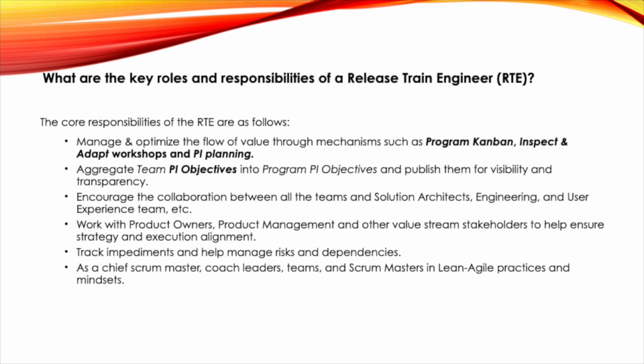What are the key roles and responsibilities of a release train engineer? The core responsibilities of the RTE are as follows. Manage and optimize the flow of value through mechanisms such as program Kanban, inspect and adapt workshops and PI planning. Aggregate team PI objectives into program PI objectives and publish them for visibility and transparency.